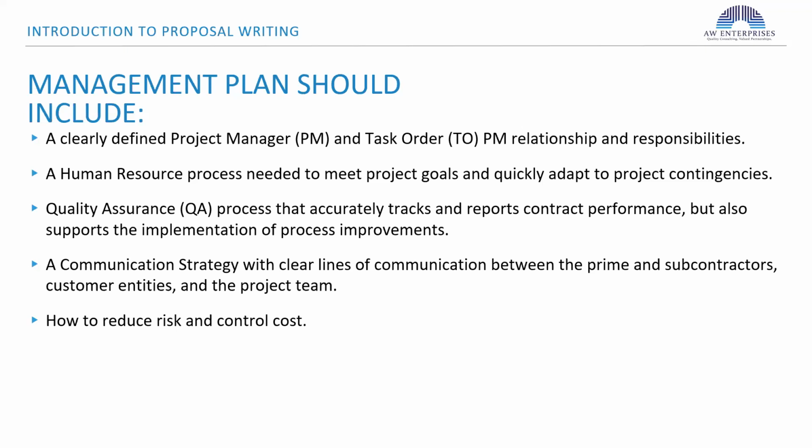You need to manage it to make sure you stay within budget on a monthly basis. That's why during the performance of the contract, the managers meet with the government, and they want to know how many hours you have burned, meaning how many hours your staff worked, and what that means to the project progress and how much funding you've spent.